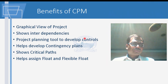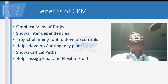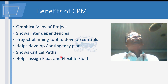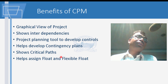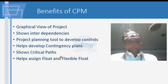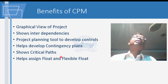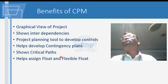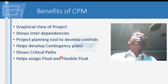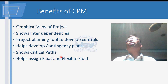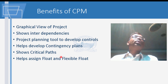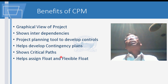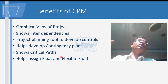Some benefits of CPM include contingency planning. For example, if you plan to concrete but a thunderstorm collapses part of your excavation, rework is costly and affects your schedule badly. A 'what-if' analysis is possible when you have the schedule done, allowing you to have a contingency plan in place for such scenarios.